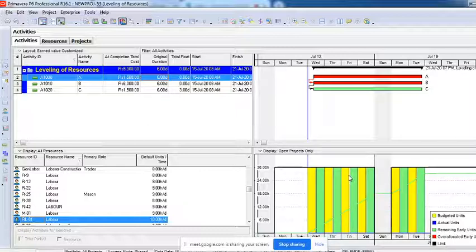My requirement in this project was 4 laborers per day, because I have assigned 1 on A, 2 on B and 1 on C per day. 1 plus 2 plus 1. But when I got my committed resource list, I got to know that only 3 resources are committed per day. But I cannot change the total duration of the project as well. So how do I utilize less resources now? I'll have to think about that by doing resource analysis.